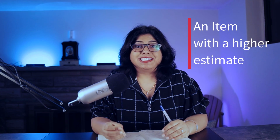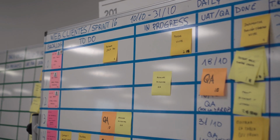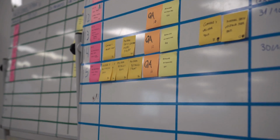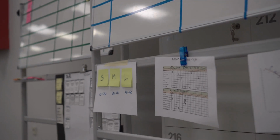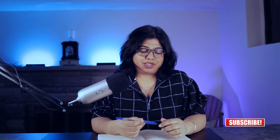houses multiple user stories. There is a higher chance of a story with an estimate of story points, say 3 or 1 day of effort, will be delivered within that estimate. Whenever my team is working on an item that has a high story points or more number of days of effort tagged to it, I try to keep an eye on it, because more often than not, there will be things and complexities discovered mid-sprint, and we'll have to tackle them head-on as we go to ensure that we are able to meet the sprint goal.